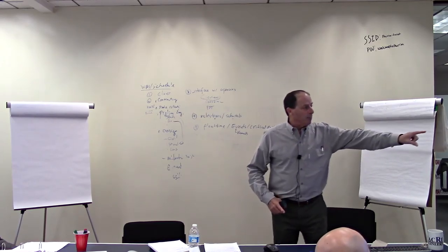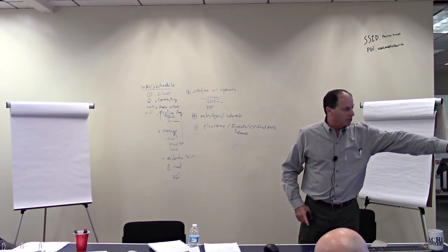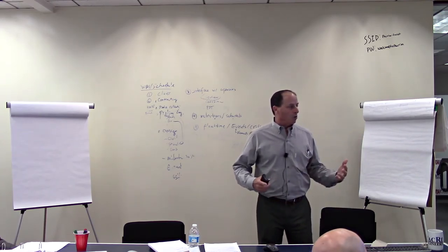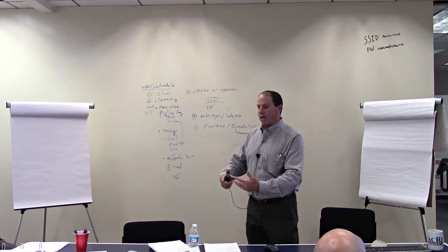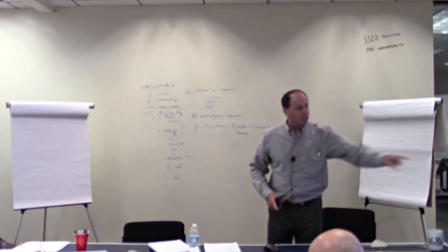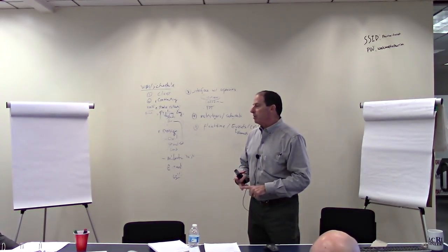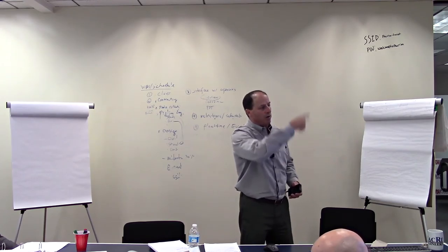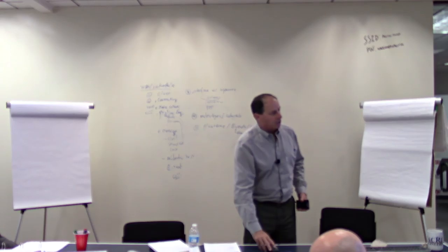One is, quality control starts at the beginning. It starts with how we scope the job, because we're going to make sure we know what we're doing. Post-award, so now we've got the job, we're making sure we've already assembled the team that can do the work correctly. But post-award, these are a lot of the things we're just talking about: develop the work breakdown structure, critical path method schedule, specific QA/QC plan, review it with our whole team, get to a kickoff meeting, execute the design.